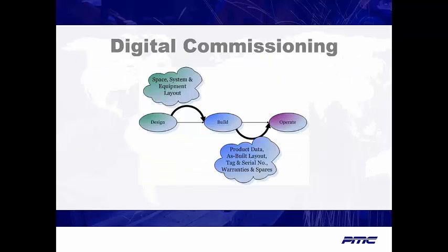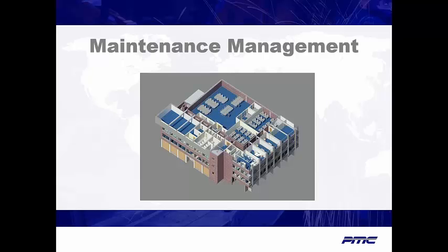COBie was developed by a number of U.S. public agencies to improve the handover process of building owners and operators. The primary goal is to ensure that owners receive the information about the facility in as complete and as useful a form as possible. COBie is a non-proprietary format based on a multiple-page spreadsheet which can be integrated with the 3D model for visualization and collaboration. If utilized to its maximum capabilities, BIM can produce value throughout the life of the facility.